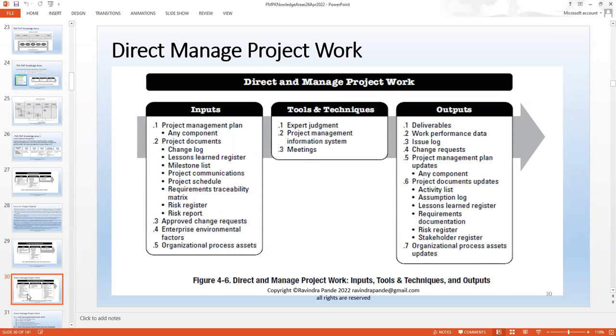In many organizations, this is done automatically without the knowledge of even the project manager. If any change has been notified, it goes to the change control board, and the change control board, if at all approved, normally gives it to the project manager to consider. Otherwise, it gets rejected or it's planned for the next phase, and rejected diplomatically because the client is paying for a project, right?